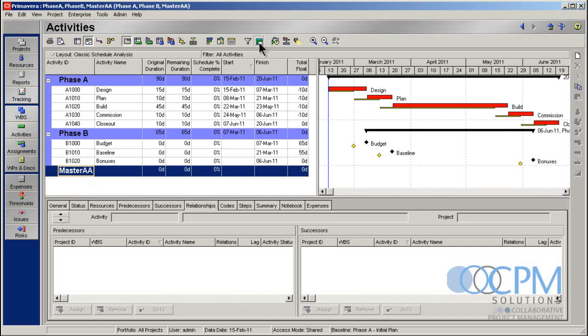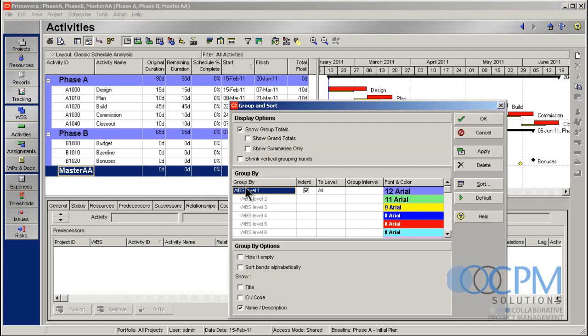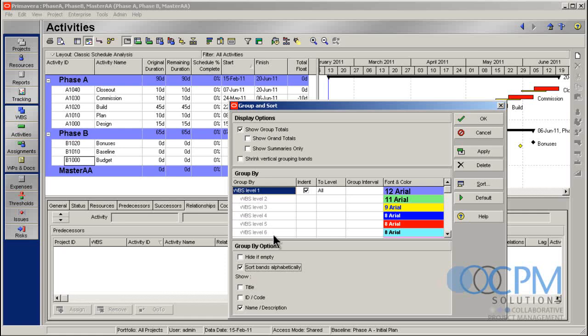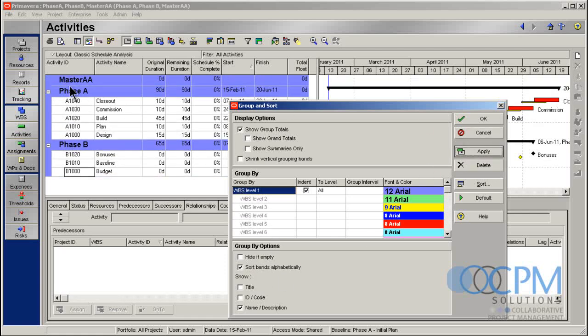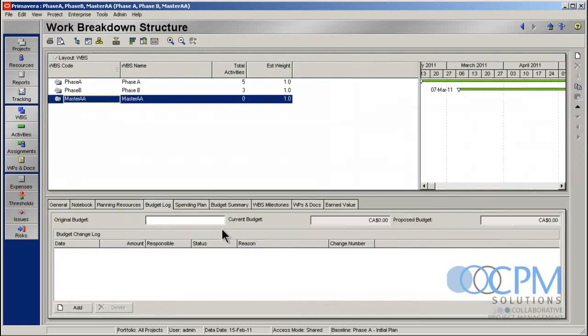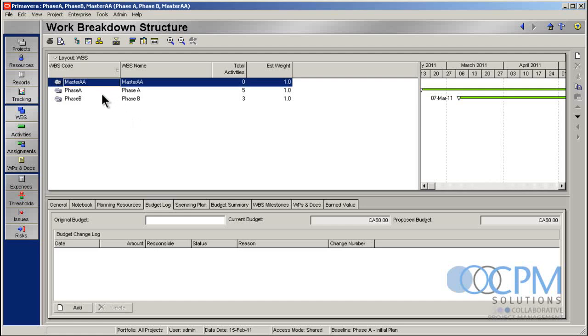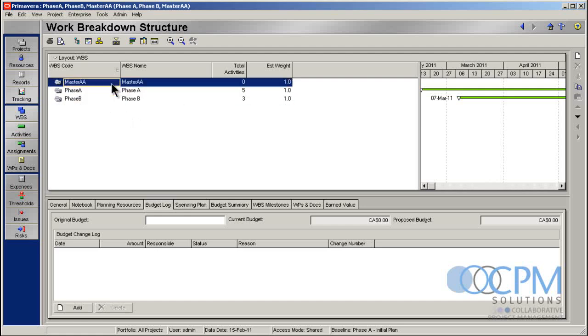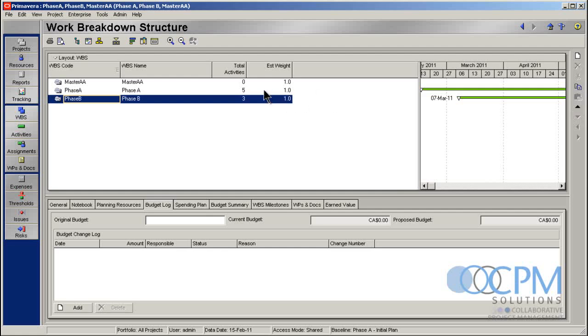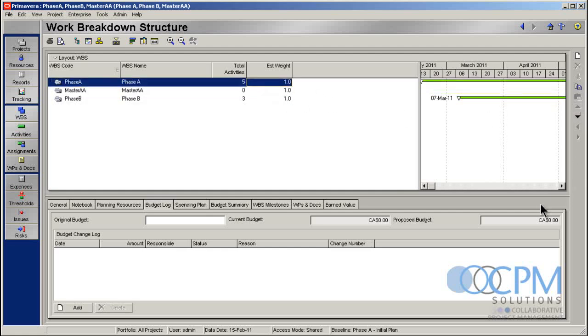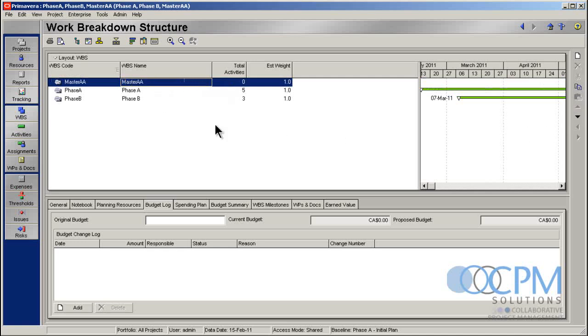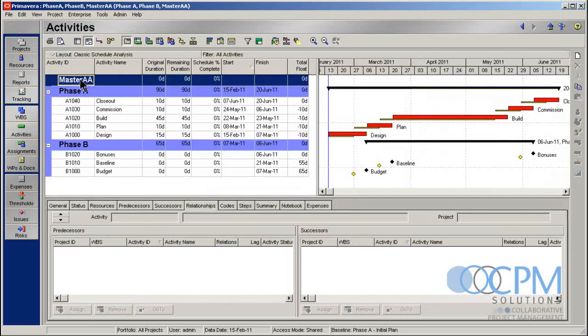Well, one thing I could do is what we want to do actually is we want to go in here and we want to turn on this sort bands alphabetically. Now one thing about this is this may sort all your WBS bands alphabetically. However, for me, it's producing the desired result I want. It puts the master AA project up at the top. So that's one way we could do this. What's another way? Let's go explore. The other way to do this is actually to use the organizing power of the WBS. So if I go into my WBS window, I can see how my projects are listed here and I can use the arrows to organize them any way I want. So I want master AA, phase A, phase B. I could, again, reorganize these any way I want. I can have them like that if I wanted, et cetera. So use the arrows over here in the WBS window, the work breakdown structure, to organize those. Come back in here. Here's my master AA project.